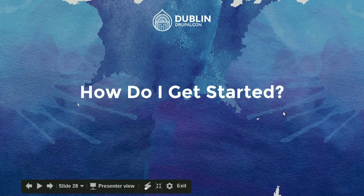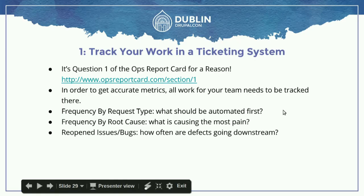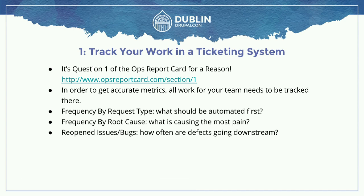Hopefully I've won you over on this stuff and you're asking: how do I get started? Six steps. I'm not going to say it's easy, but they're clear. The first thing you've got to do is track your work in a ticketing system. It's question one of the ops report card for a reason. If it isn't in a ticket, it doesn't exist. That's really important when starting this. All of your work has to be tracked in the ticketing system so you have a single place of information to query.